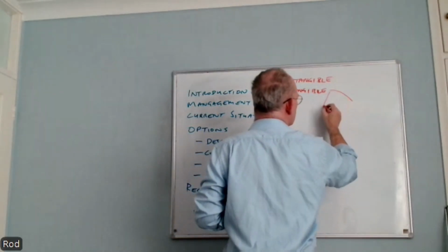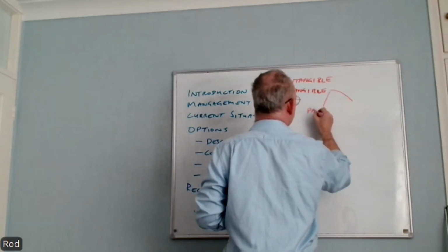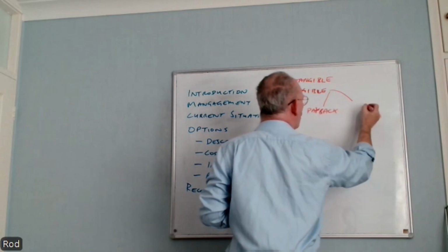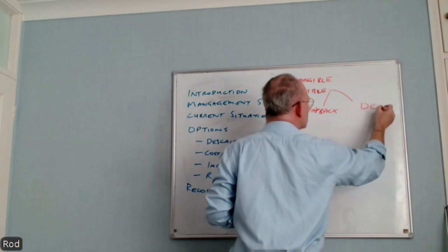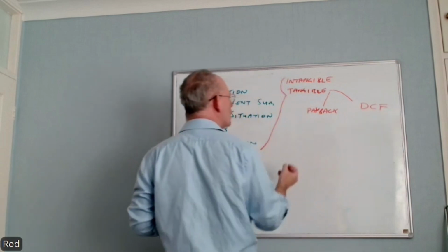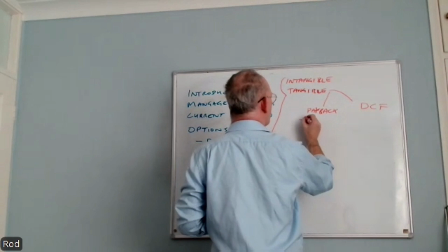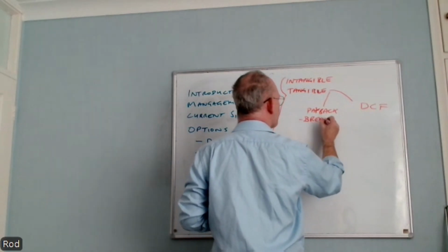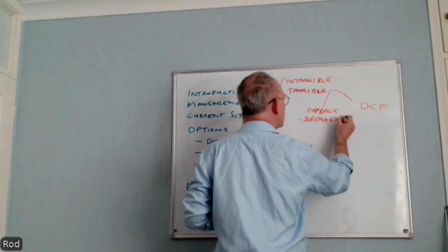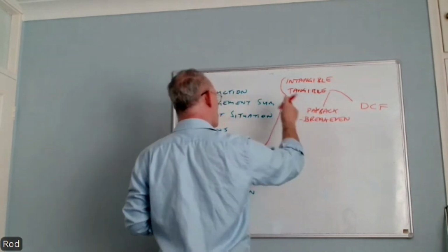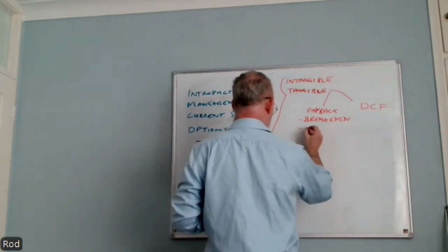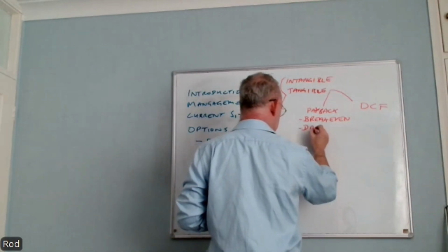And that investment appraisal will either be payback or it will be the discounted cash flow. Payback is all about which date we break even, i.e. which date our benefits exceed our costs. So it's all about giving a date, usually in years.